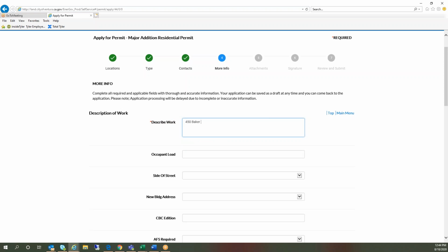Can I interject with a quick question? Did we just uncover a good example of how CSS changes the calculus? For example, before CSS, we didn't need to inform the customer necessarily who the required applicants were, because we just enforced that on our own, right? But now that it has the interface, we have to configure it such that it's required. Is that a good example? Yes. Correct. And Jason indicated that change has to go all the way back to configuration.